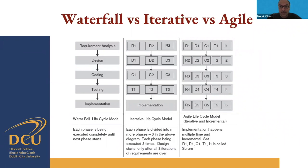Most importantly, all iterative and incremental segments in agile are done in a time box — it is a time-boxed event. In an iterative lifecycle it can be time-boxed but it's not necessarily required. However, if you say you are doing agile, you must understand that you should be doing things in time boxes.